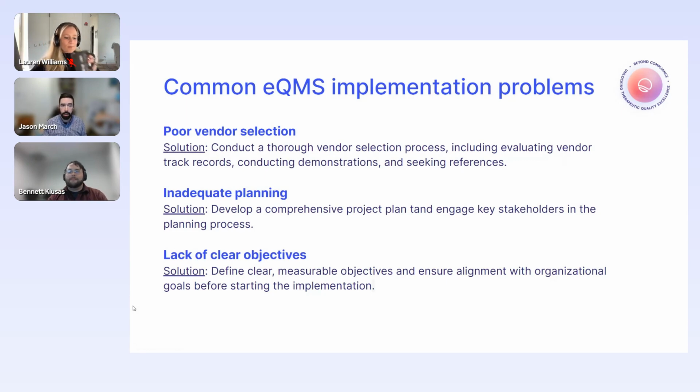The other piece that I think is going to be very important is your planning aspect. An eQMS sounds great for your organization. You're going to save a lot of time, effort, you get rid of paper. All of those are huge selling points. But what a lot of people forget and sometimes just jump over is the fact that you do need to plan beyond the initial launch. You need to make sure that you have a focused group of folks who are going to get your content up and going. So procedures, right? If you have an existing set of procedures, make sure to get those in the system. Any process development.